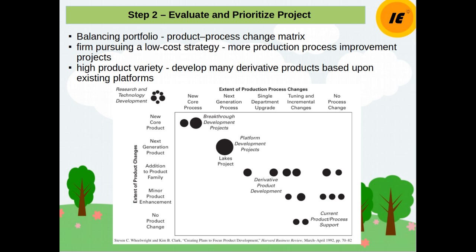This perspective can be useful to illuminate imbalances in the portfolio of projects under consideration and in assessing the consistency between a portfolio of projects and the competitive strategy. For example, a firm may discover that it has identified essentially no breakthrough opportunity, or that it has no project aimed at incremental improvement of the existing product.